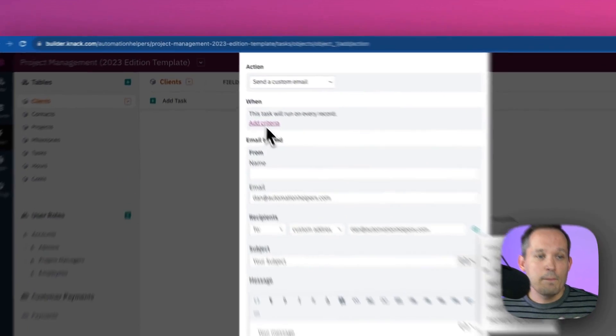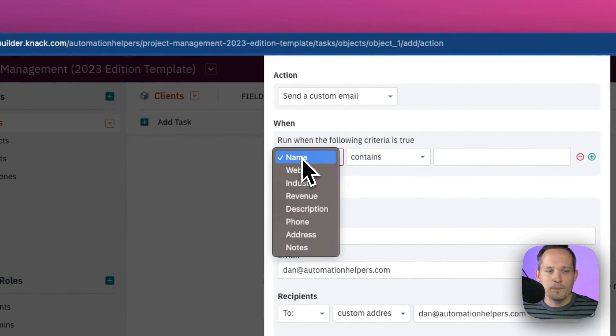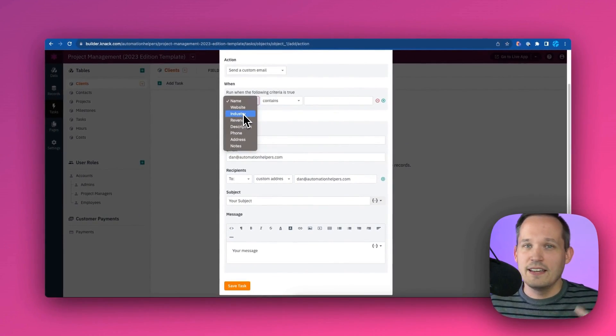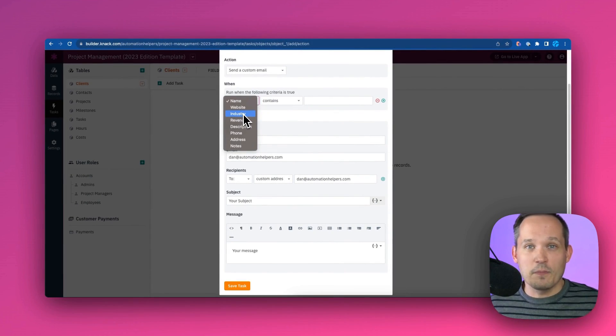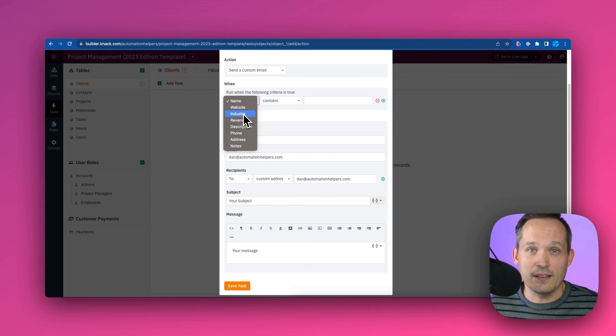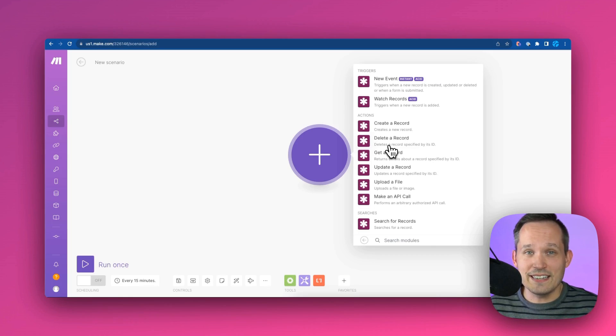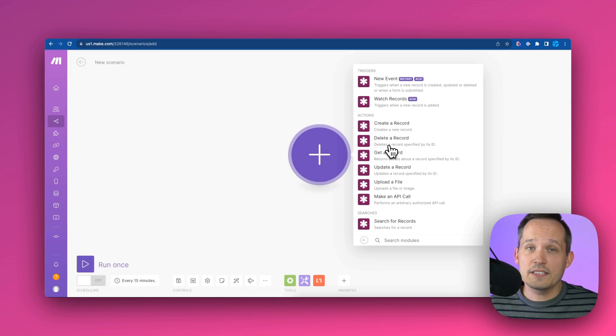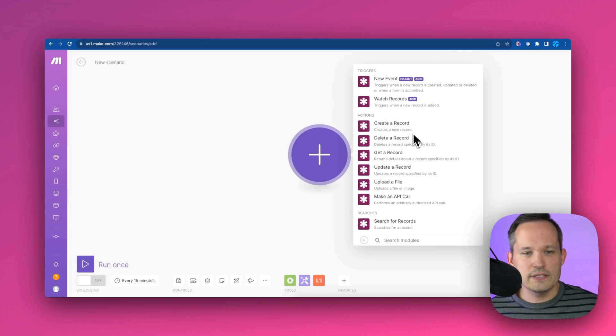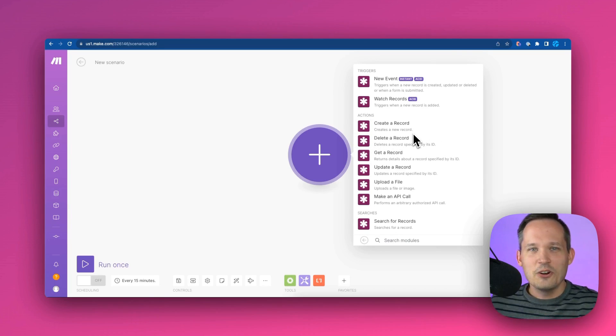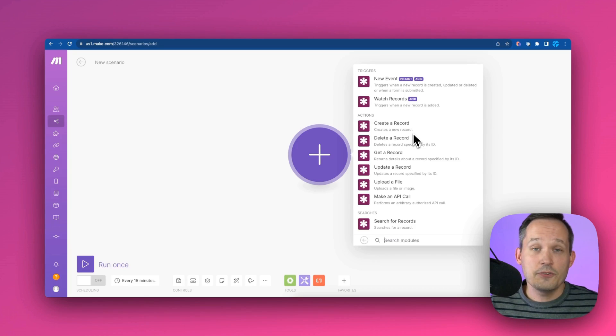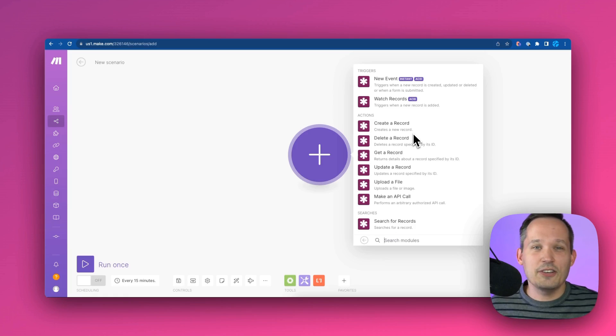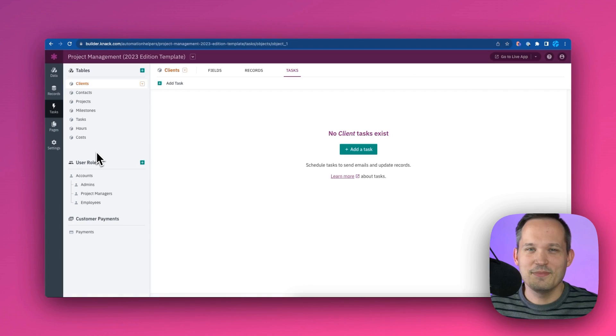And then we could do this based on certain criteria. We could say, hey, if this field value equals this, if the status of the project equals a red status, and we want to inform the project stakeholders, then we could send off that email. Now, for those of you who want to build deeper automations and integrations with Knack, you can certainly do that either with Make or with Zapier, and they expose their API as well so that you can create different automations. You can say, hey, if a record gets created, run this logic and update the values back in the system. So if you find yourself ever limited by the task functionality, you can just plug it into your favorite iPaaS of choice.